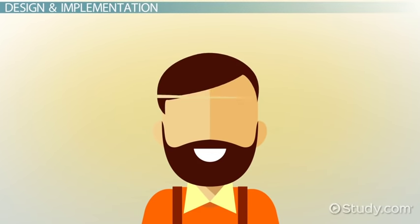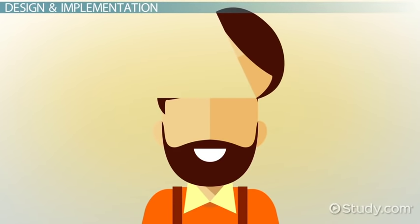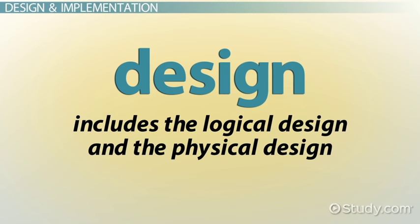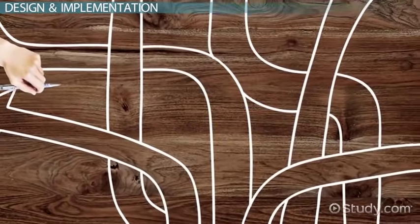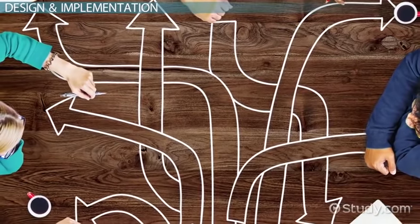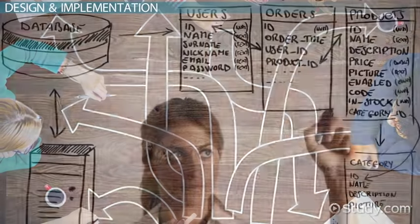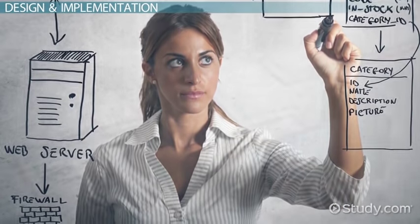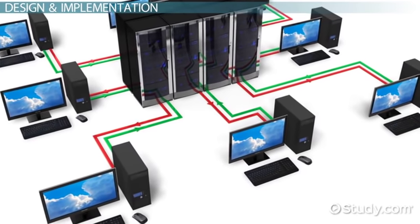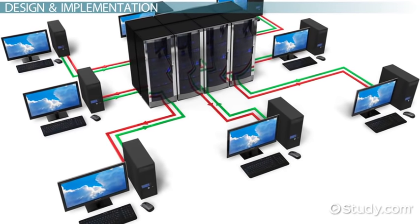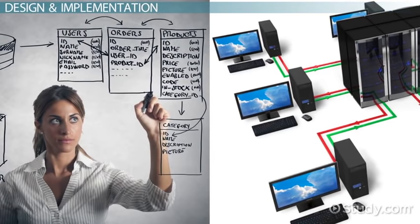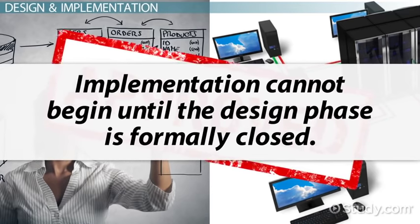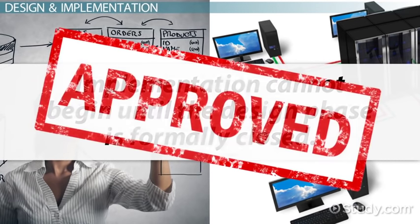With the requirements in mind, the project team designs the software to meet the stated business needs and solve identified problems. The design phase includes the logical design and the physical design. The logical design is an abstract representation of how the software data flows — the inputs and the outputs — often shown graphically as a data flow diagram. The physical design determines the hardware, such as storage and network hardware, which will make the logical design a reality. Once fully complete, the project team will review and approve the design.